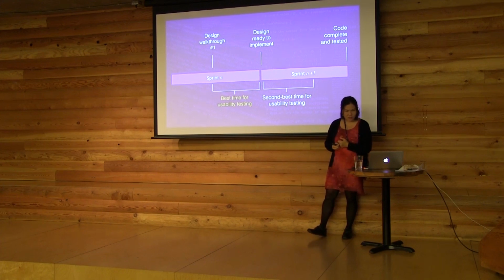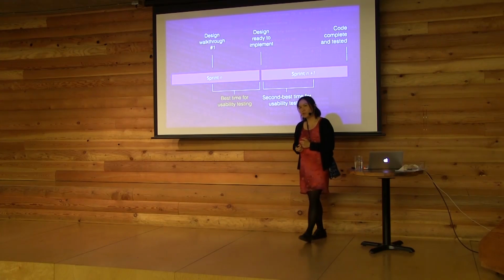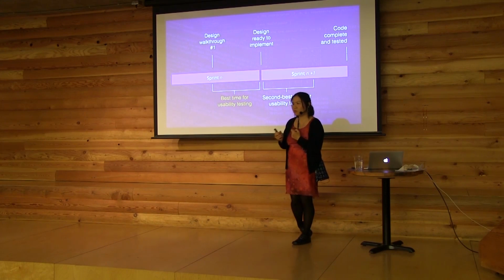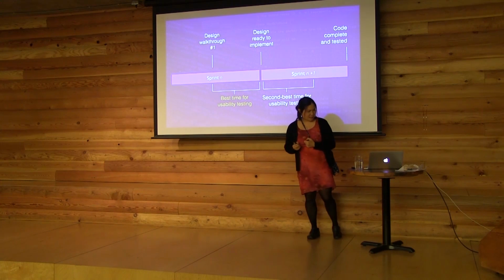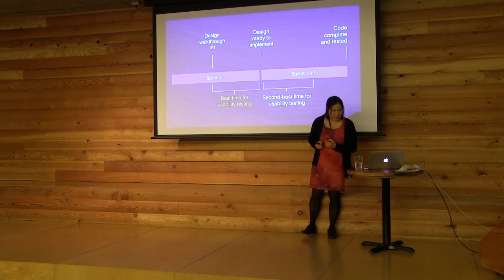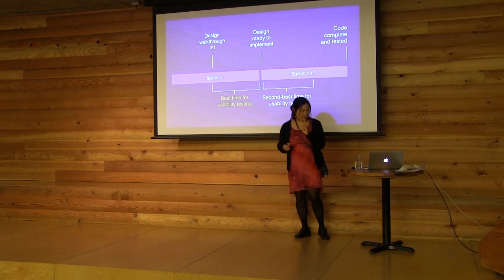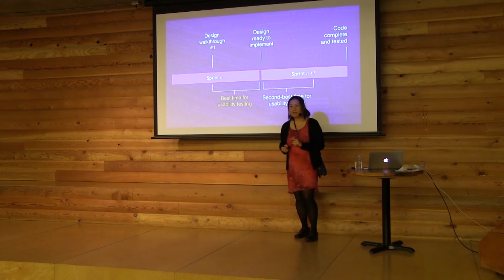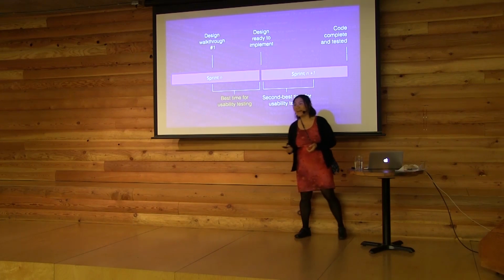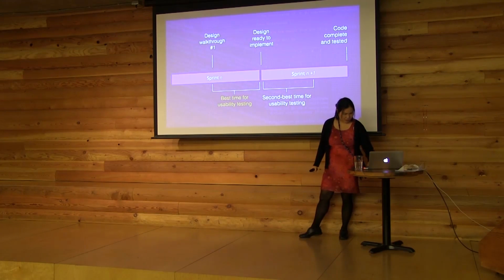So one of the companies that was profiled, one of the case studies that I read, TechSmith, has 2 developers just to fix actionable items from user studies. Okay, so they do their user testing, and instead of saying, oh gosh, we can't do anything about this because we've got all this other stuff, you've got people dedicated to do it. It's kind of like a tiger team for dealing with those action items.